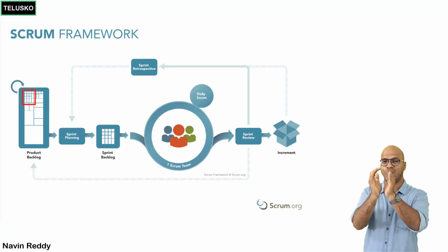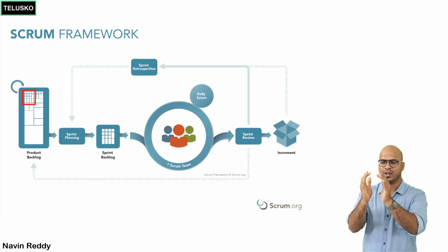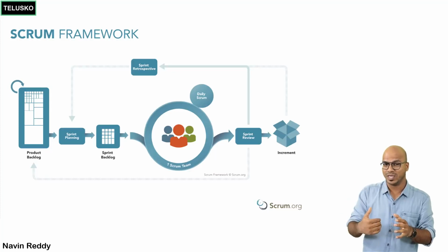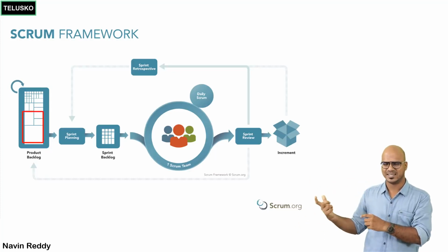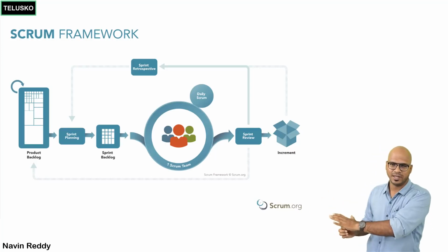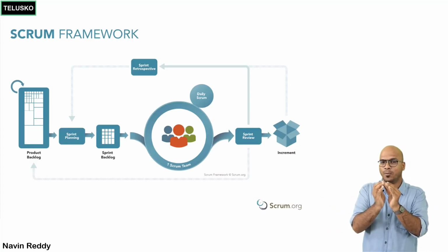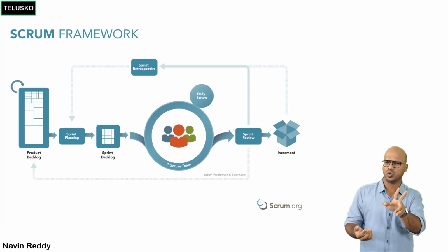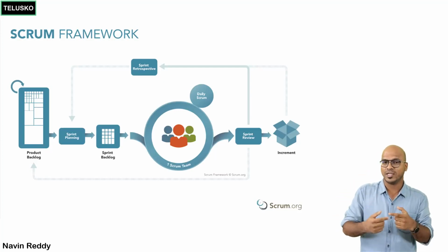So let's say we have a big requirement, you can break it down for the current sprint or for the current week. Other requirements, you can just have as they are. You don't know how to work on them or what the subparts of them are. We can define them later, right? But let's say if you have a module with you, or if you have a set of requirements with you, which you can complete in 1 or 2 weeks or 4 weeks, now that will define your sprint time.